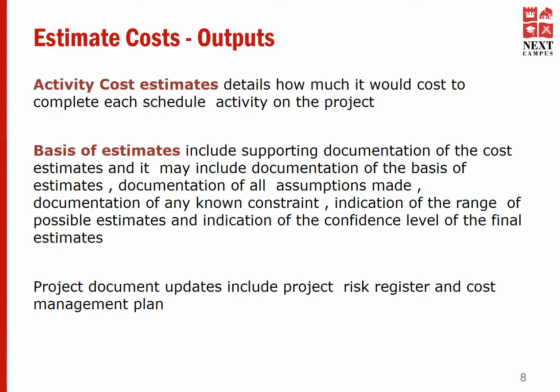project. Basis of estimates. Basis of estimates include supporting documentation of the cost estimates and it may include documentation of the basis of estimates, documentation of all assumptions made, documentation of any non-constraint, indication of the range of possible estimates, and indication of the confidence level of the final estimates. Project document updates include project risk register and cost management plan.